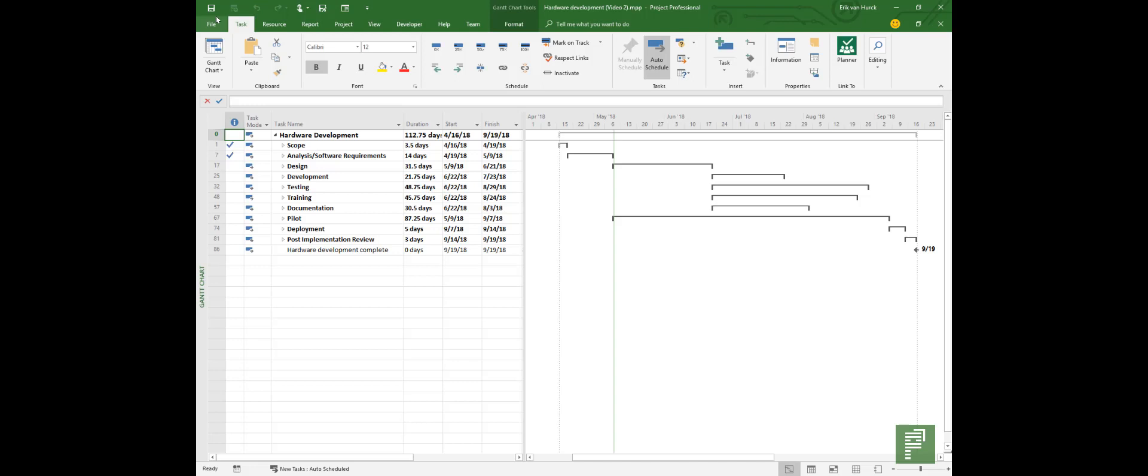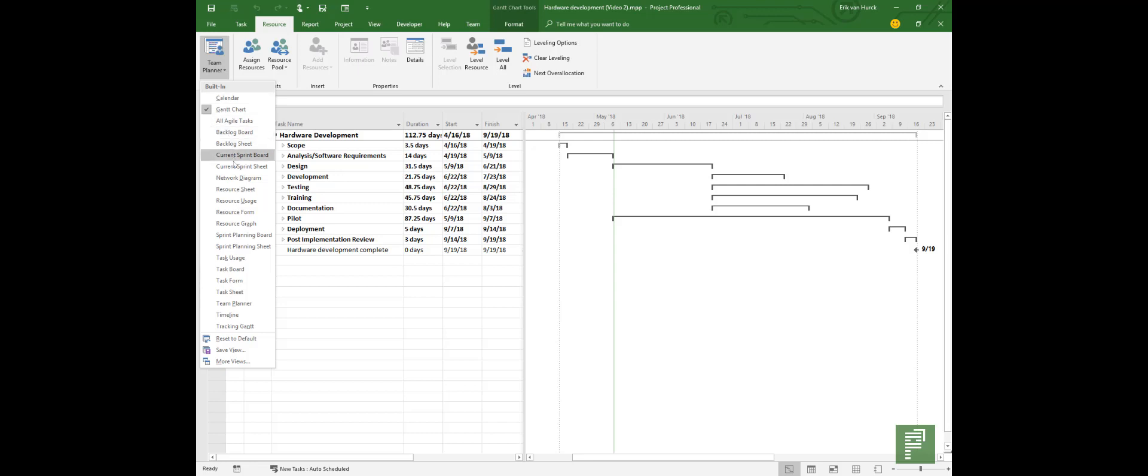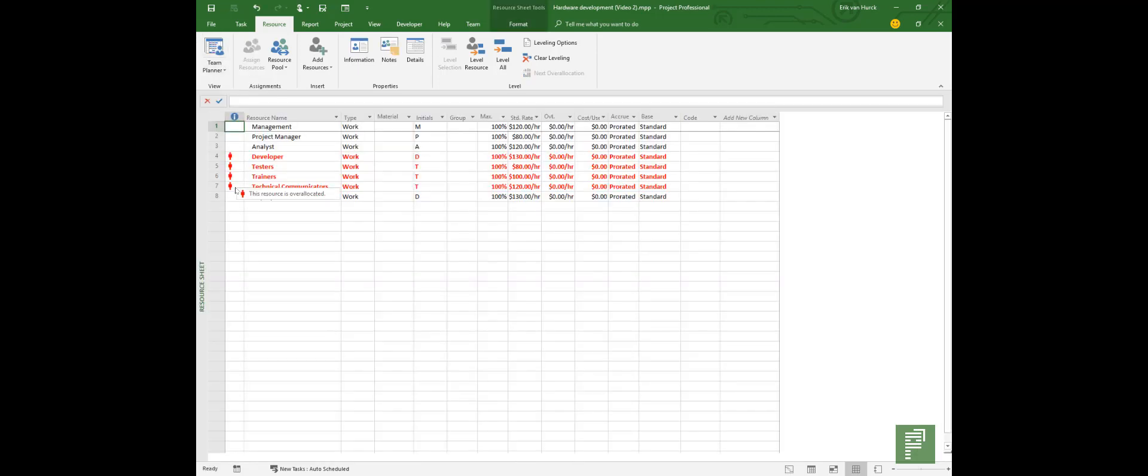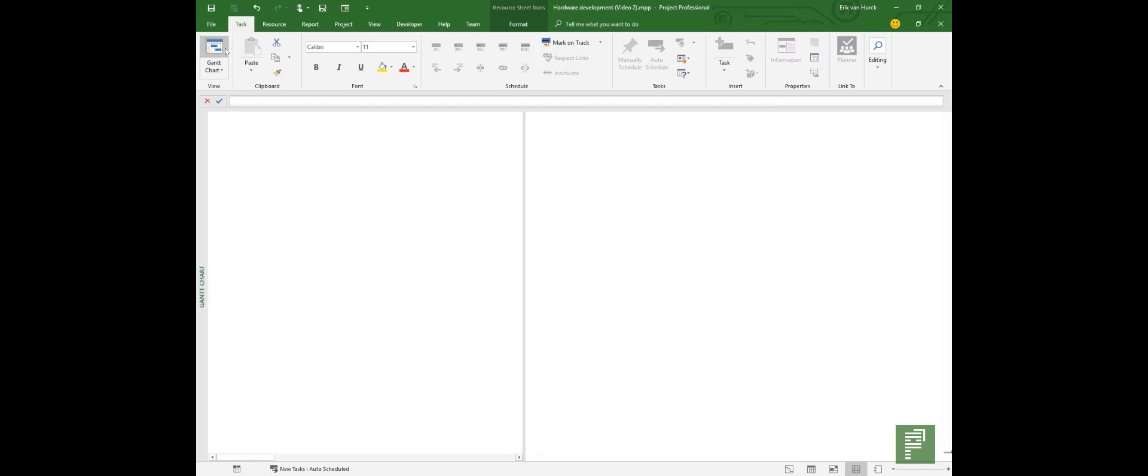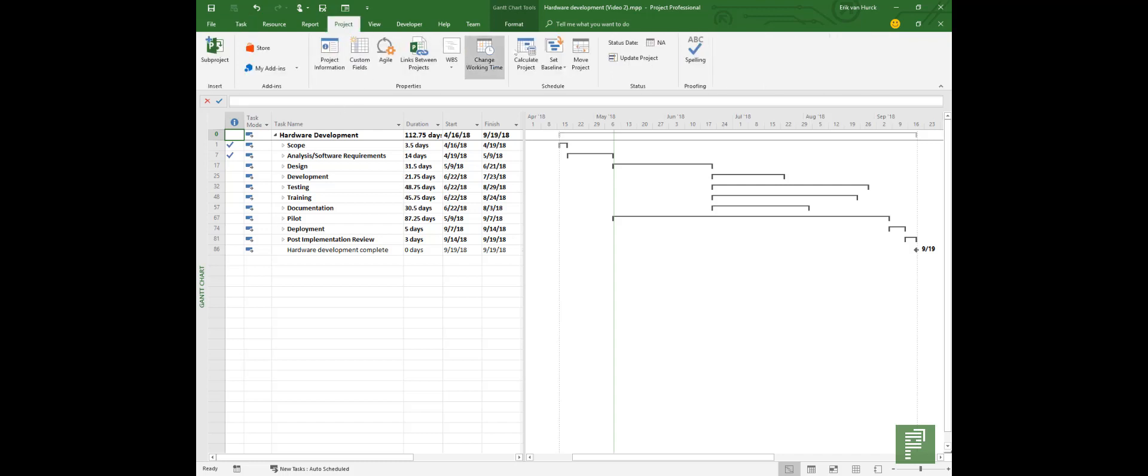The project that you're seeing here actually comes from the Office templates. So you have a software development project, and I changed that a little bit because software development nowadays goes agile. So I changed it to hardware development. I also added some progress and to give a bit more information about costs, I've added resources together with their standard rates. So a manager might be 120 euros. I've also added something very important, and if you know a bit about myself then you know that I do like to set a baseline every now and then.